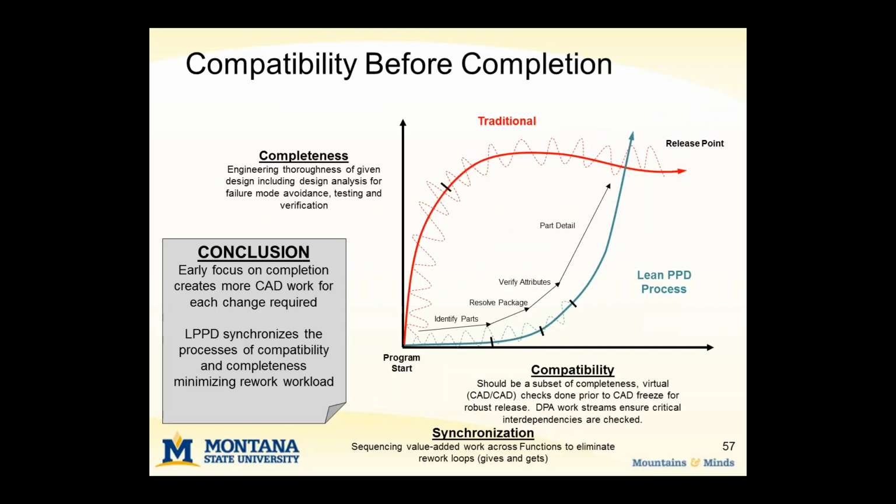So one of the things that you're doing as you're evaluating the alternatives in your set is try to make sure that you have compatibility. So try to ensure that compatibility before you worry about getting the design too terribly complete. Because if you spend a lot of time detailing out a design only to find out later that it's not compatible with someone else, you're going to get yourself into another loop back. And again, you're producing a lot of waste there.